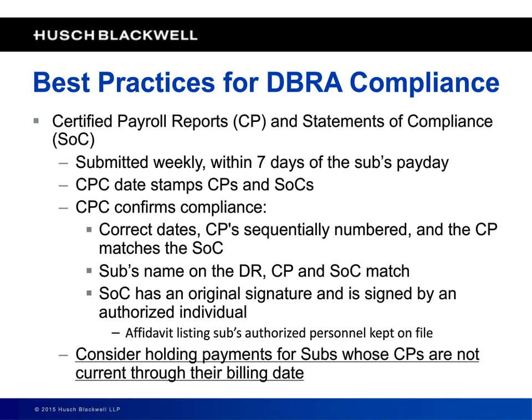Your clerk is going to make sure that the individual that signed that statement of compliance, that you have an affidavit on record for that individual saying that they have authority to sign. And then they have to match up. They've got to go through the process, and it's very tedious, but someone's got to do it. They've got to match up.